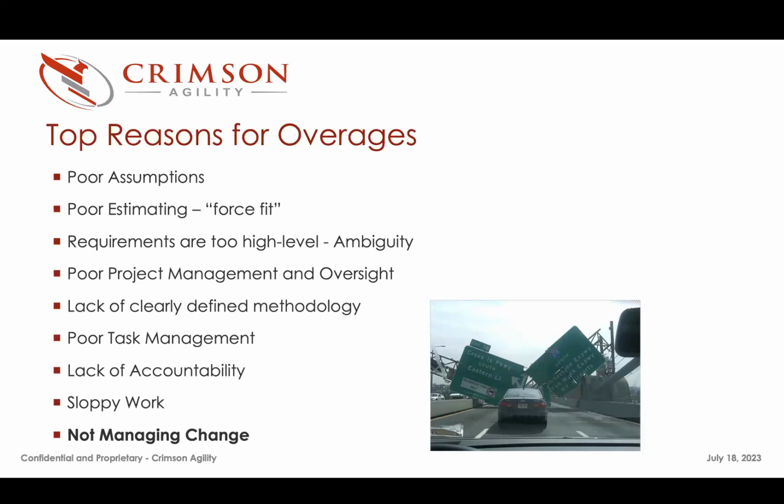The same is true of validation and deployment. What is our expectation? How many deployments are we going to do? What does the UAT and remediation process look like? How much time is allocated to the go live checklist and the day of go live? Make sure that that's well defined, and that way deviations can be pointed out as requiring additional time in many cases.